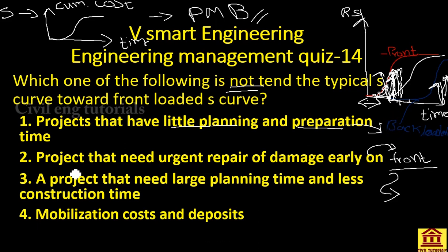Likewise, a project that needs an urgent repair of damage early on. If you have an early urgent repair of damage, it will also need a higher cost at your earlier times. If it causes a higher cost at earlier times, you will have a front-loaded curve because you have a higher cost at earlier time.